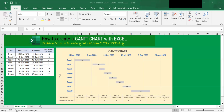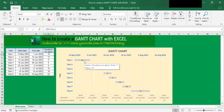In the table here, you can see that task 1 starts on 15th May and ends on 1st June. So the duration between 15th May and 1st June is 18 days. You can see in the chart that the duration for task 1 is 18 days as well.